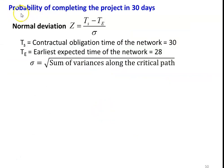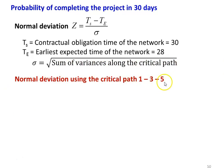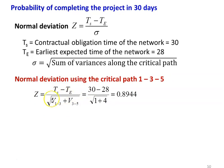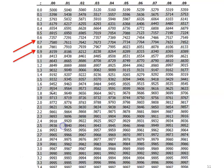Now we calculate the probability of completing the project in 30 days. To calculate the probability, first we find the normal deviation Z = (Ts - T) / sigma, where Ts is the contractual obligation time of 30 days, T is the earliest expected time of 28, and sigma is the square root of the sum of variances along the critical path. Using critical path 1-3-5: Z = (30 - 28) / sqrt(V(1,3) + V(3,5)) = 2 / sqrt(1 + 4) = 0.8944. Using the normal distribution table, the probability is 81%.